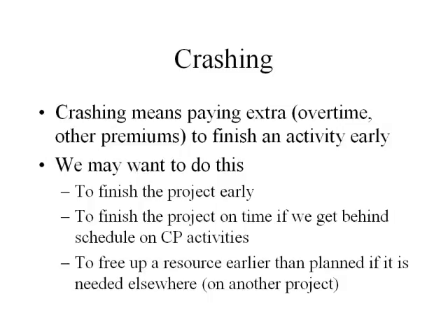Perhaps there's a resource required to perform that activity, and that resource is needed on some other project in our company, so we need to get that resource done early. So we either need to expedite that activity or maybe expedite a predecessor activity to that activity so that that activity can start earlier.